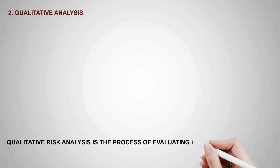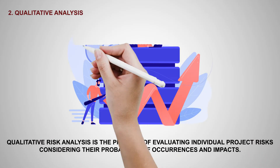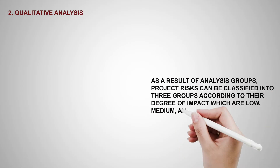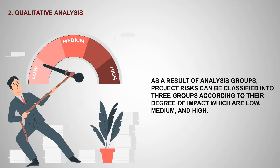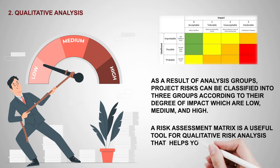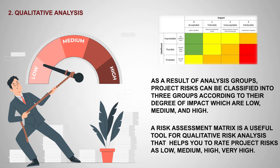Step 2: Qualitative Analysis. Qualitative Risk Analysis is the process of evaluating individual project risks considering their probability of occurrences and impacts. As a result of analysis, project risks can be classified into three groups according to their degree of impact, which are low, medium, and high. A risk assessment matrix is a useful tool for qualitative risk analysis that helps you to rate project risks as low, medium, high, or very high.